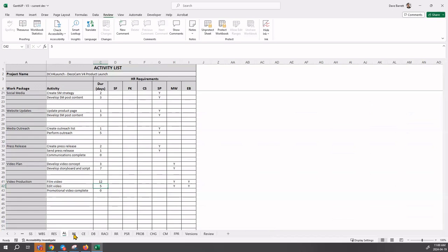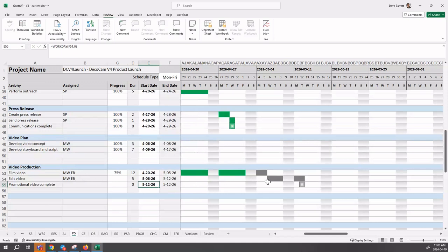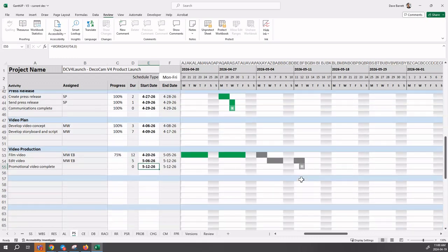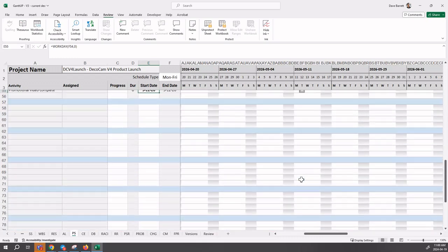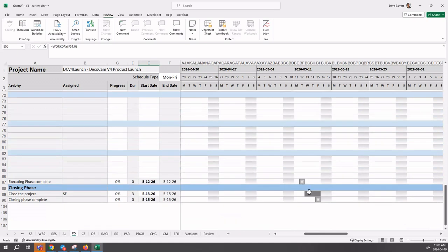If we go back to the project schedule tab, we can now see that we've extended into the next week, May 4th and 5th. Because of the dependencies, this now pushed 'edit video' - it was supposed to start Monday but it's now starting Wednesday and going into next week. It's pushing the completion of the entire project by two days.